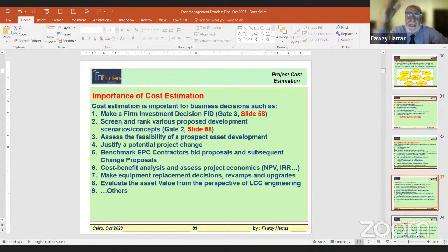If the estimates are, say, plus 10%, 15%, maybe they are reasonable. But if an estimate is less by 15% than your estimate, then you really suspect. You should suspect, because the market says, for example, bidder number 1 says 1 billion, bidder 2 1.1 billion, bidder number 3 800 million. Definitely this is underestimated for some reason, one of the 2 possibilities we just mentioned. So going with this off-market range bid involves really serious problems to the project execution.